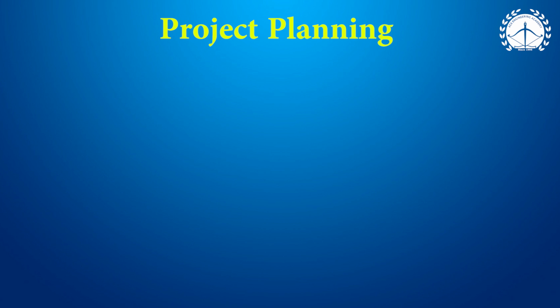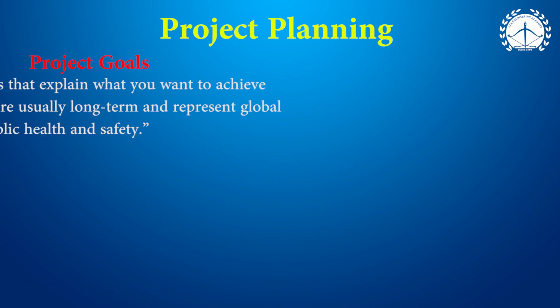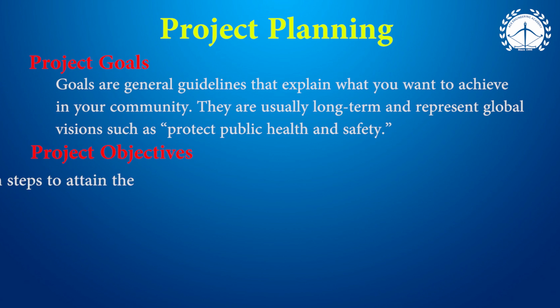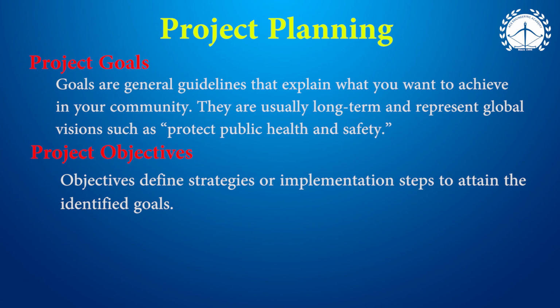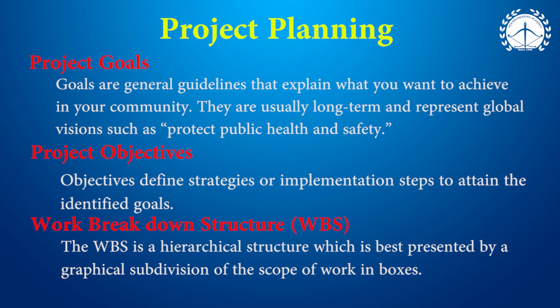The next phase, planning. In planning, first we need to define vision and mission. What are the major goals? What are the specific objectives? We need to distinguish them. When the objectives and goals are completed, then we can break up the work, like we can go for work breakdown structure, where various work elements we are going to identify.